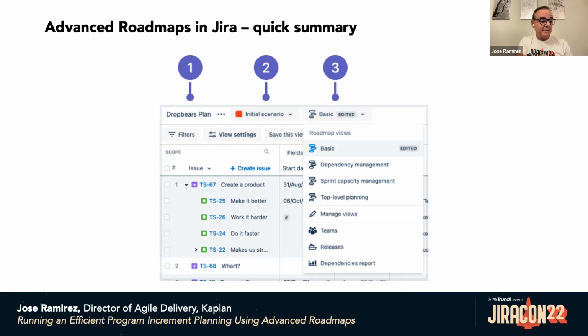The very important concept that is included in number 3 is the teams concept. And again, this is really, really, really important. Teams is a field in Jira that we use to identify agile teams with a name. So you don't use the project key to identify a team, and this is really, really important. Because in Jira, as you probably know, a project is in reality a backlog.